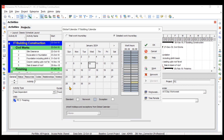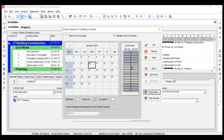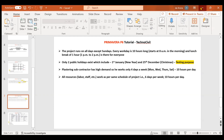This change applies to Monday through Saturday but not Sunday. Choose Monday to Saturday and click OK. If Sunday becomes unintentionally removed as non-work, go back to Work Week, select Sunday, mark all periods as non-work, and click OK. All Sundays will be non-work again. Any other day now shows 10 working hours per day.